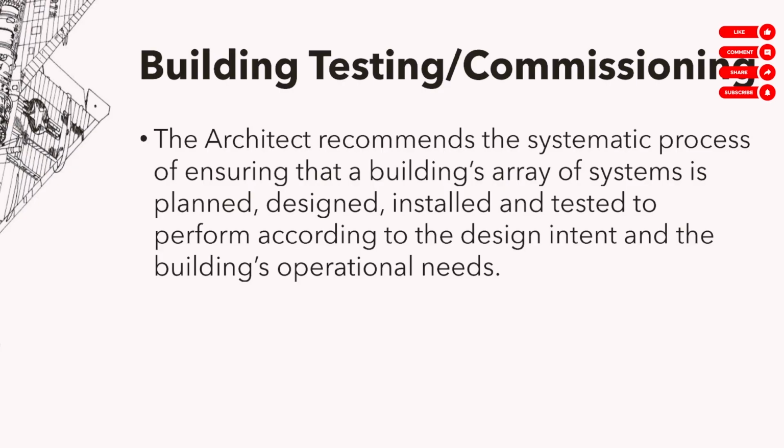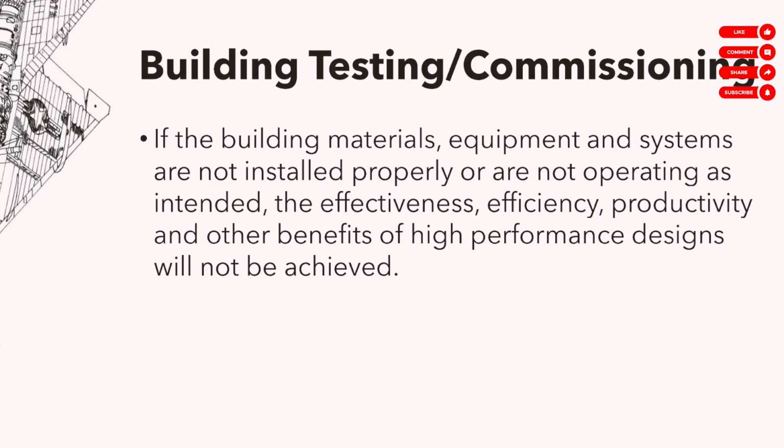So, this is mostly a consulting job. Okay, consultant job. You're not going to test them yourself, not necessarily. You're just going to parang recommend a system, a manner of testing and commissioning. And hinire ka because gusto ni owner siguro ng peace of mind, gusto niya makasigurado na tested and commissioned properly in building. Because if they're not tested properly, if they're not installed properly, hindi makukuha yung benefits of high performance designs. This is especially true for very expensive energy-saving equipment.